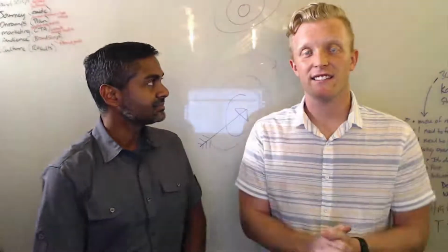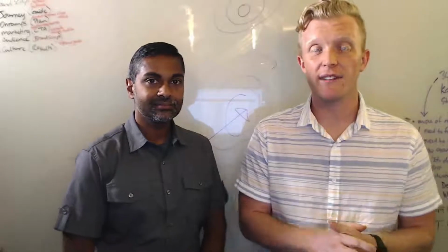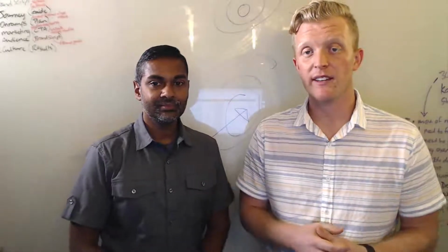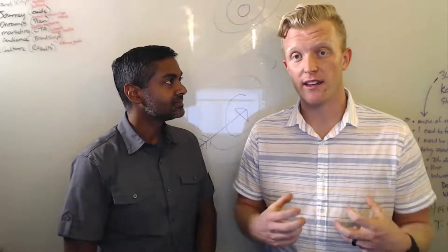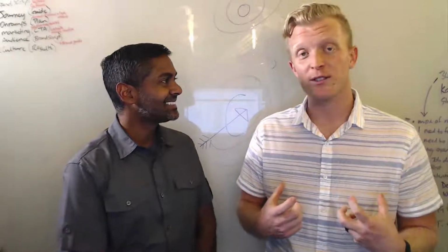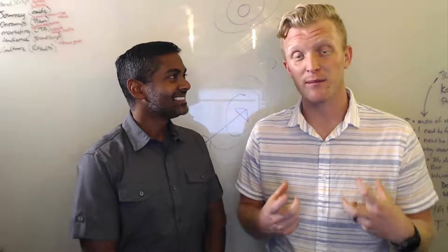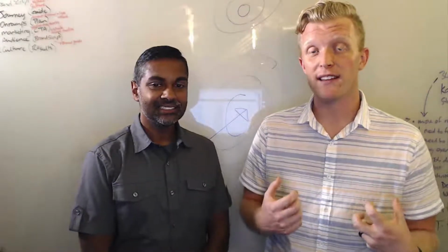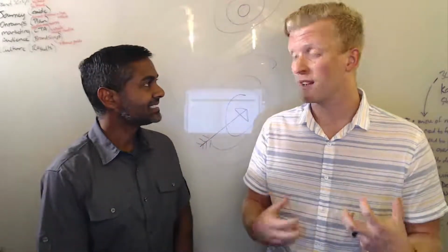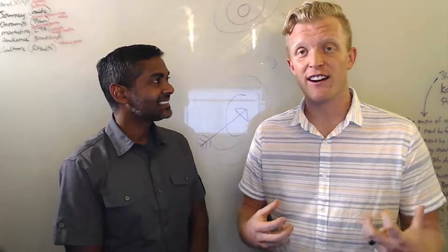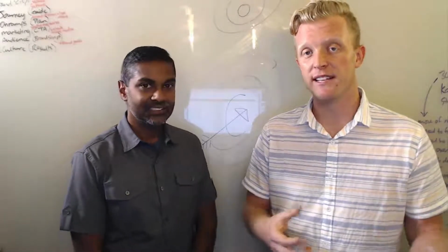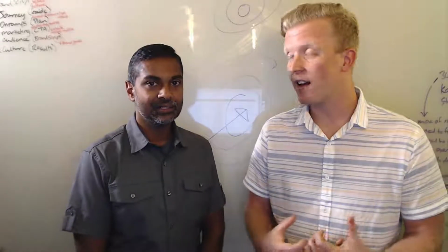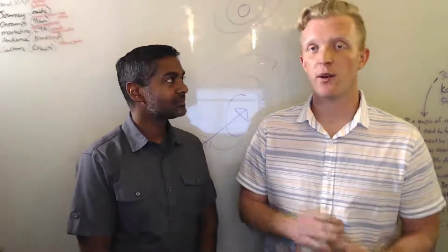And I think it's key to have the plan ahead of time and to have the team in place, so that you're getting the right person capturing your photography. Because if you were to give me the camera, I might be really willing to do it, but that doesn't mean I have any idea what I'm doing. However, if you ask me to manage hospitality and make sure those interactions are good, that sets the whole team up for success. So assign people not to where the need is, but where their strengths lie, and that will help the day of the event go off really well.